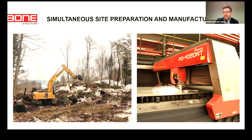So what's good about this method and this process that we have is that the builder can focus on what they need to focus on. They don't have to worry about scheduling the parts of the entire building envelope when they're going to get to the job site. They just let us know, hey, I'm going to have the foundation ready at this time. Get the materials here at that time. And then we'll coordinate. We typically have about 5 or 6 different deliveries that we're going to coordinate at the times that they need them. So it's more of the ready to install shipping, instead of just dumping everything on site, and then they're not going to need half the things till 3 months down the line.